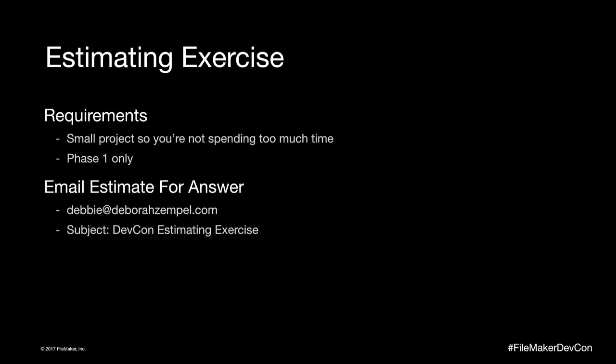Sure. A couple of things that we've done to help that exact process is that when we do hourly billing, we give the clients a budget to actual report. That way they can see exactly where they are based on the feature sets that we've put into the system. And I give that to them so they can start managing us. Because if you look at the whole budget in totality, it looks great until you get to the last 10%. And then all of a sudden you're like, oh crap, I've used 80% of the project life and only have 10% of the budget left. That last 10% is always the hardest part in any project, getting over that hump, getting through the testing, getting back feedback, and doing all that stuff.